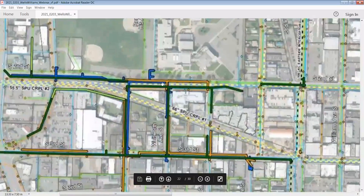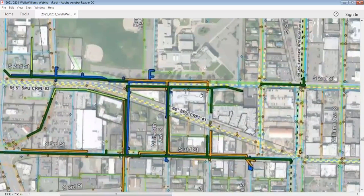Yes, there is a way to figure out when we'll be where. We don't necessarily have that exact yet, but as we get further in this project and work out a better schedule with the contractor, we will definitely be working with people as to where we will be and when. So at the Luther's Table site, we are going to be putting a brand new sewer in front of that. Storm will be across the street, so that will probably be a lot less impact to you. One benefit for you on the sewer: one of the reasons we're putting the sewer in on that side of the street is because your side sewer has to cross that Seattle pipeline, and it is a big obstacle in the way, causing problems for your side sewer. So we're moving the sewer to the other side of the road so all the side sewers don't have to cross the Seattle pipeline.